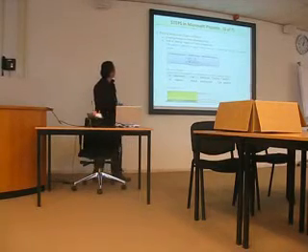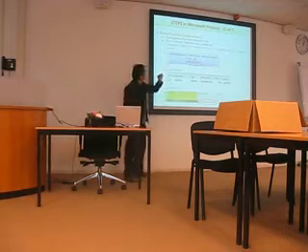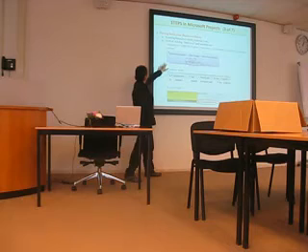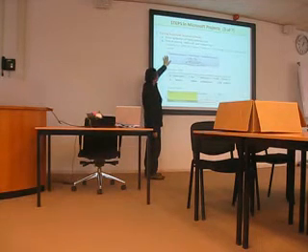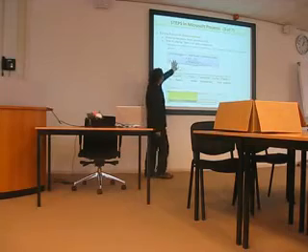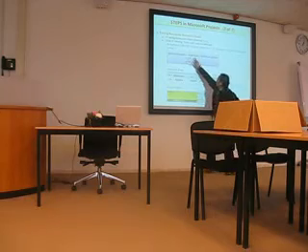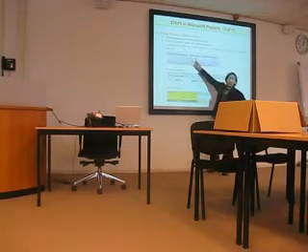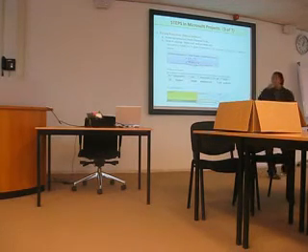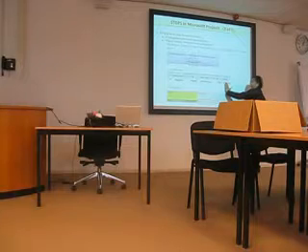Okay, this is about putting in resources. We enter resources in categories. There are three categories: work, material, and cost. And then this is the interesting part, how we solve the problem in the resources. Remember, the total guests is 125, but the 10,000 is only for 75 guests. It means we need 50% additional guests. This is the variable cost, and this is the fixed cost.